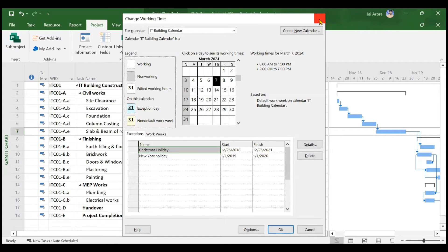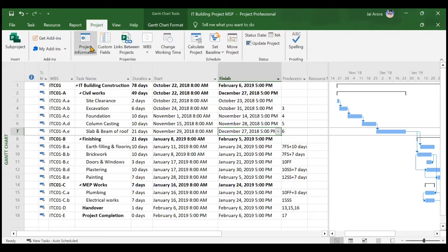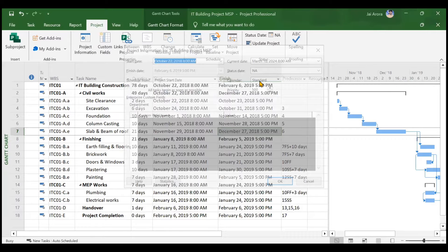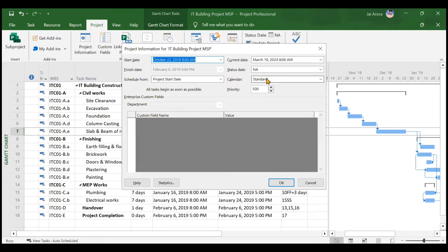Right now, if you see in the Project Information, there is a Standard Calendar assigned to this project. The Standard Calendar is the default calendar in the system, which has a timing of 8 a.m. in the morning to 5 p.m. in the evening, with a break of one hour in between from 12 p.m. to 1 p.m.